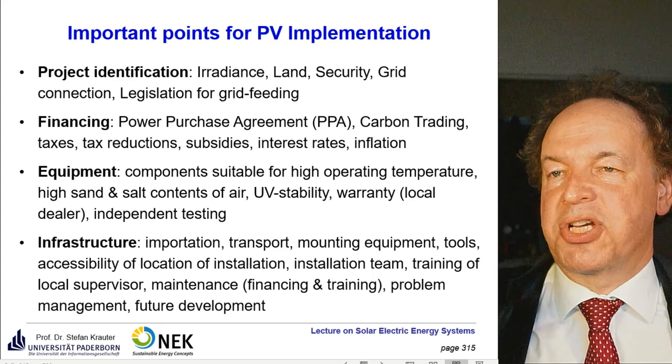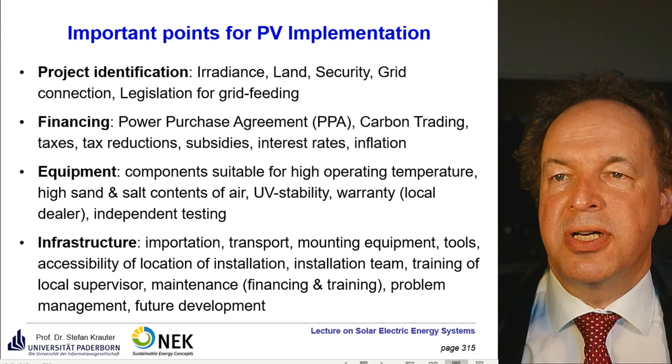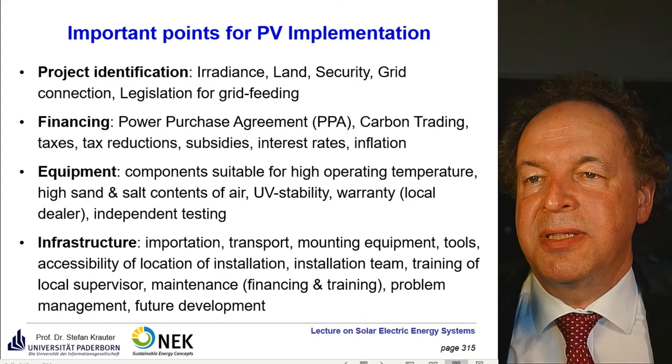Infrastructure. Importation in some countries can take an awful amount of time and cost. Transport to the site is also a considerable part. The mounting equipment, the accessibility of the location of installation. Sometimes there are rainy seasons and the roads are not passable. The installation team, the training of a local supervisor, maintenance. Also, you have to have someone to carry it out, and he has to be financed.